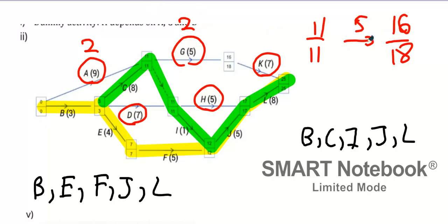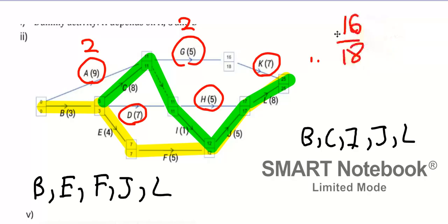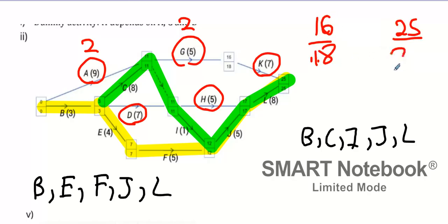Okay, let's work with K now, which is easy enough. K, same deal again. 25 take 16, 9. 9 take away 7, 2. Okay, let's try and get an answer that isn't 2.